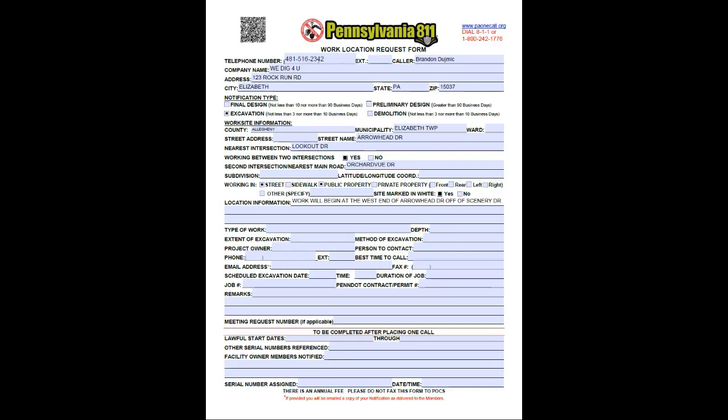Absolutely, Marcos. First off, it's important to have the county and municipality. The reason is that every facility owner out there who's a member with One Call is registered in a specific county and municipality, or several municipalities, depending on what type of facility they are, how far they run. By letting us know what county and municipality, that directs us to contact exactly the correct facility owners who are registered there. So that not everybody gets the notifications, but in this case, just those who have lines in Elizabeth Township.